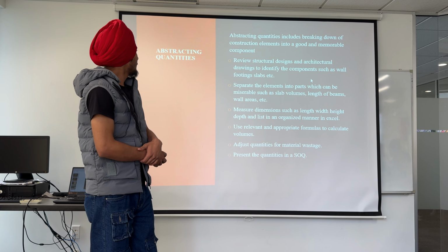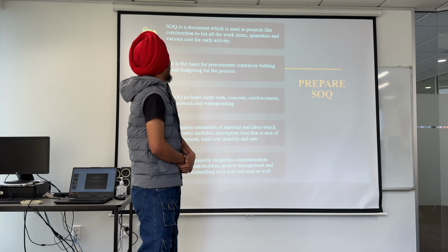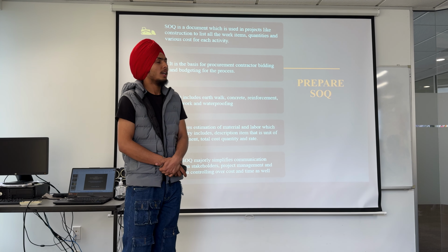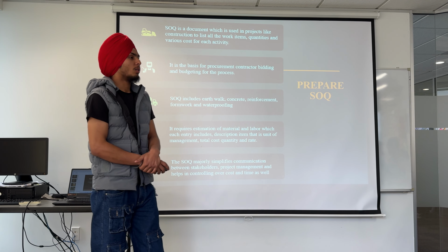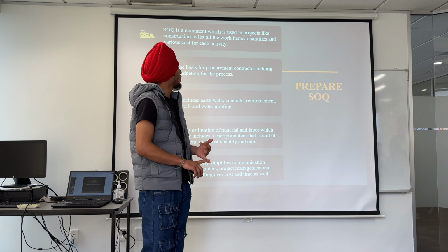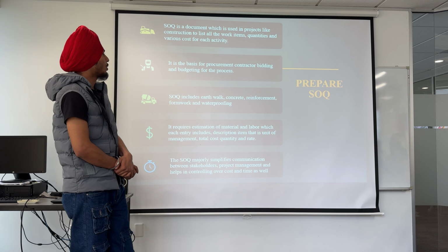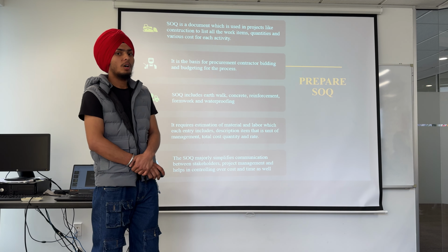The next slide is how to prepare SOQ. SOQ is a document which is used in projects like construction to list all the work items, quantities, various costs for each activity. It is a basis for procurement, contractor bidding and budgeting for the process.